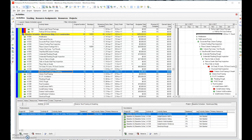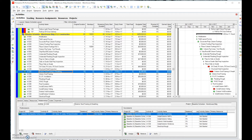Step 13 is removing redundancies. A redundancy is an unnecessary form of logic, whether predecessor or successor. This naturally happens when we go through the process of creating predecessors and successors within the project schedule. If you use my advice by assigning one to two predecessors and one to two successors, we'll reduce the amount of redundancies in the system.